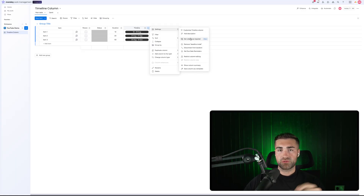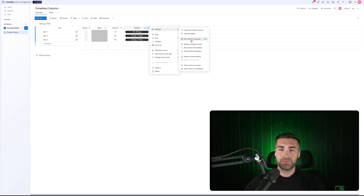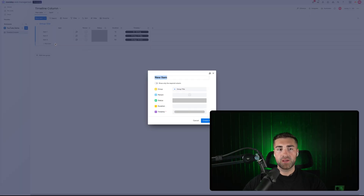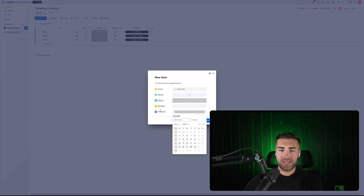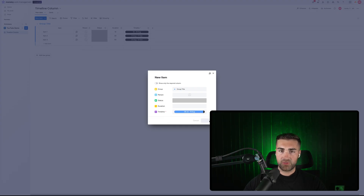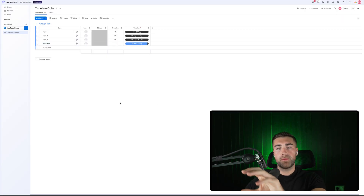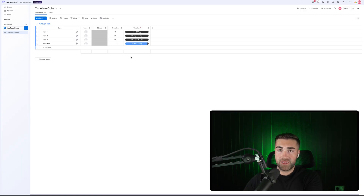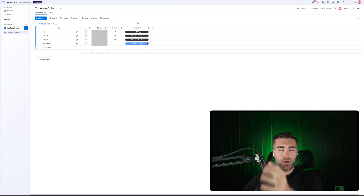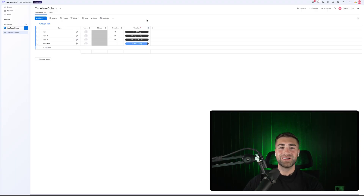You can also restrict column editing and set the column as required — a newer feature in monday.com. Setting the column as required means that when creating a new item, a pop-up form appears requiring a timeline to be entered before the item can be created, preventing items from being added to the board with missing data.